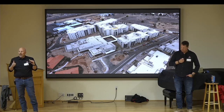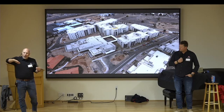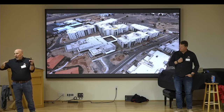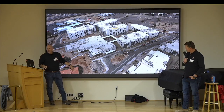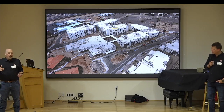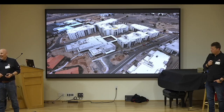And so what's happening is we are shaping the slopes to try to gain volume. You can't gain it by going deeper. They don't allow that. You have to go wider. And as you guys know from the campus, we don't have a lot of room to go wider right there. So every night we have a crew coming in, actually about 2 in the afternoon, a couple of Sundt guys that are operators, and they're shaping and shaping and shaping that. And we're shooting it again, I believe, this afternoon with the civil engineer to see where we're at.